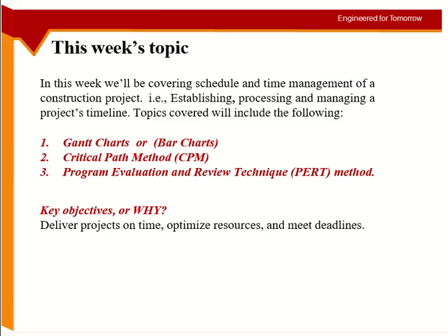Why are we focusing on the project timeline and its analysis? Because then you can plan for delivering projects on time and use your resources according to the project timeline. I posed a question when we were in the physical class: if you have three projects, all of them need an excavator, but you have two excavators, should I leave the third project? No, I will manage the timeline, so I can use my two excavators in three projects at different times.